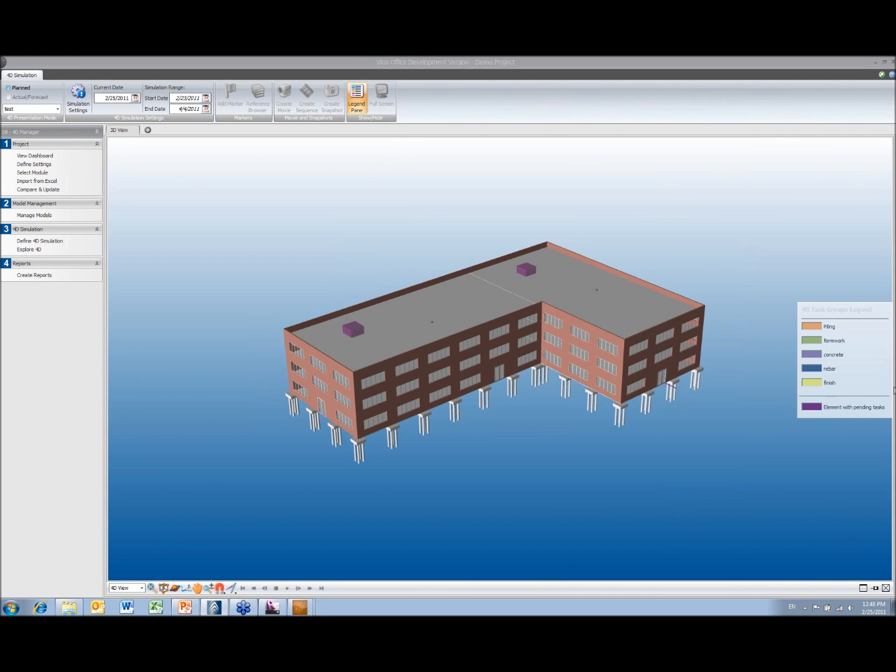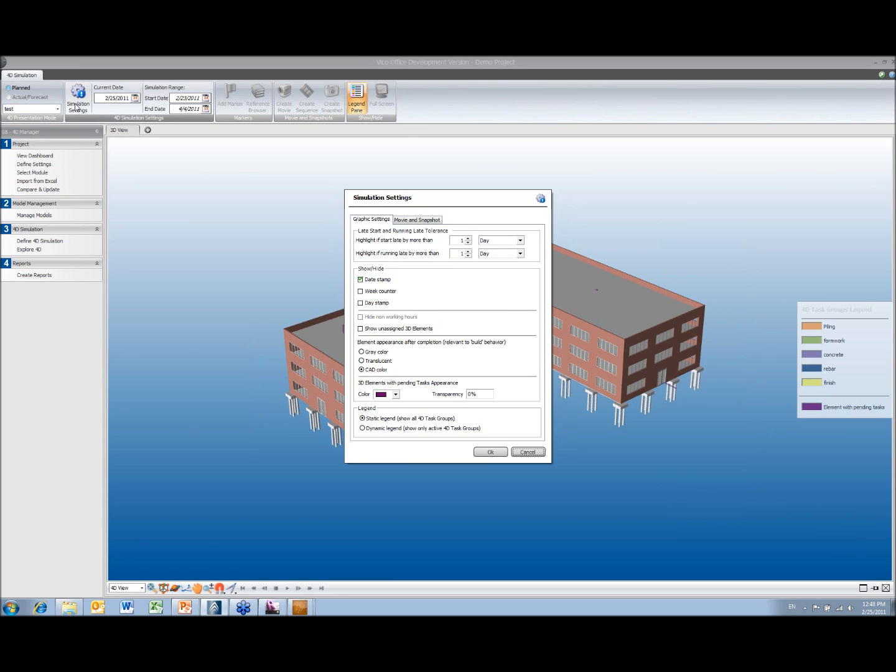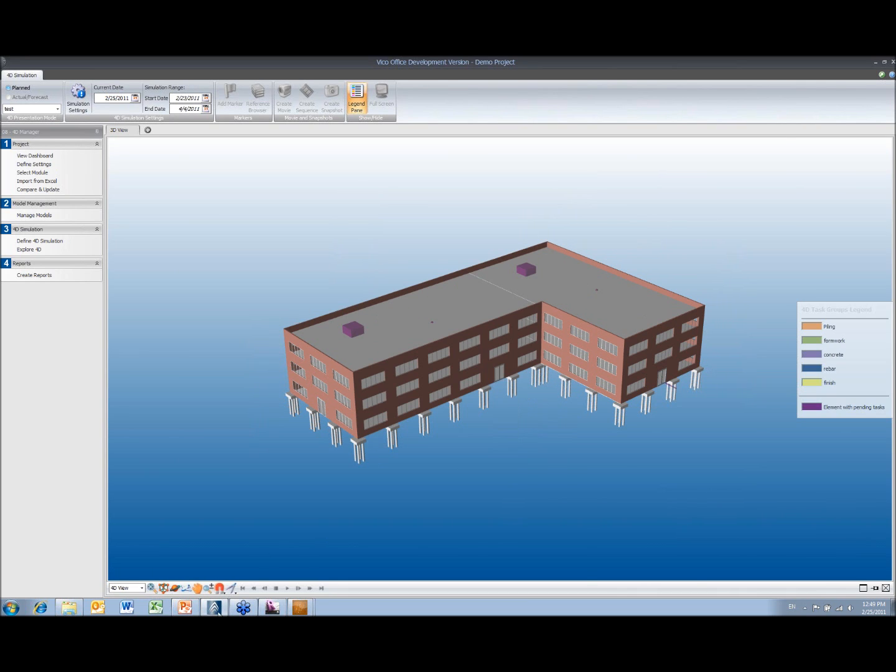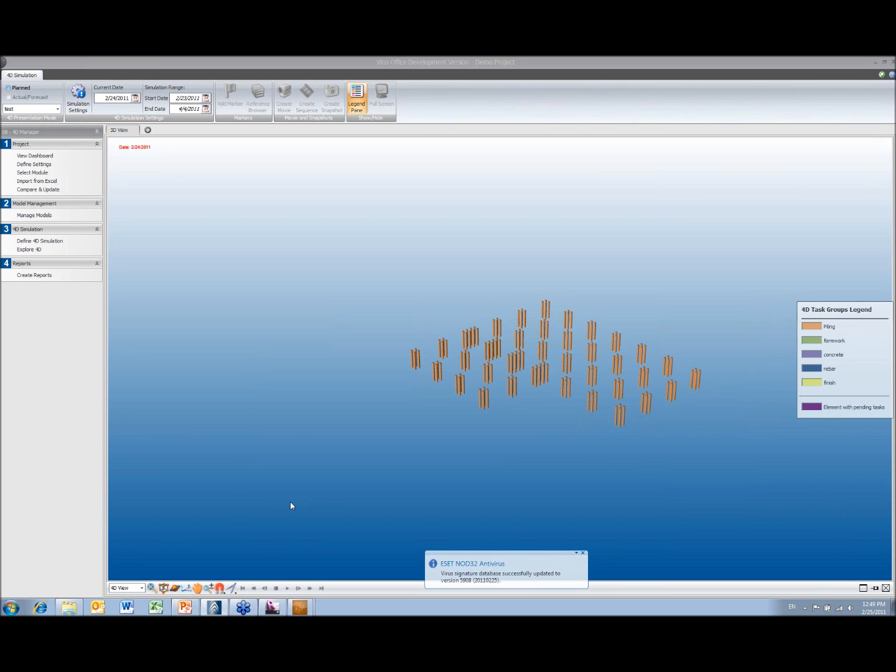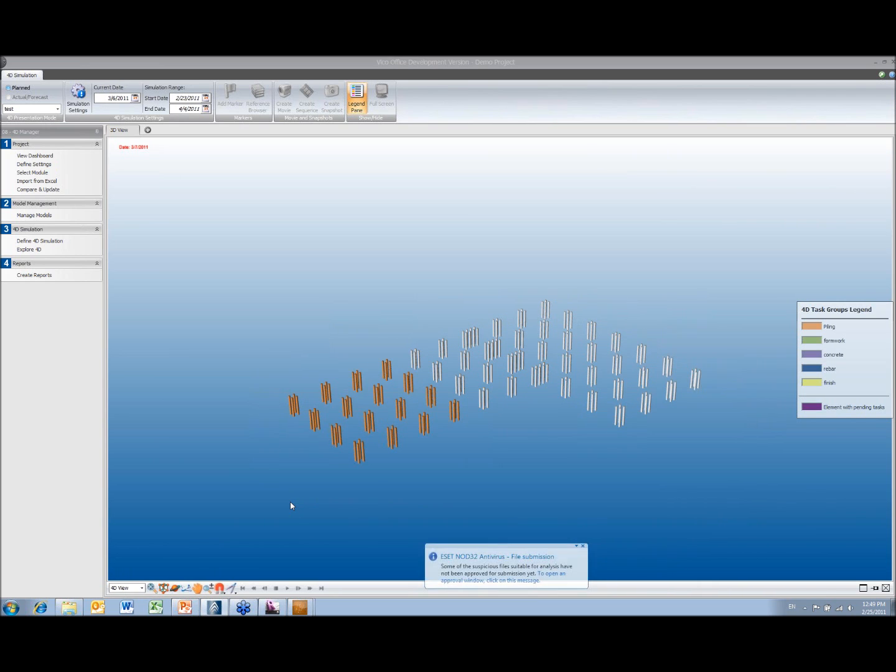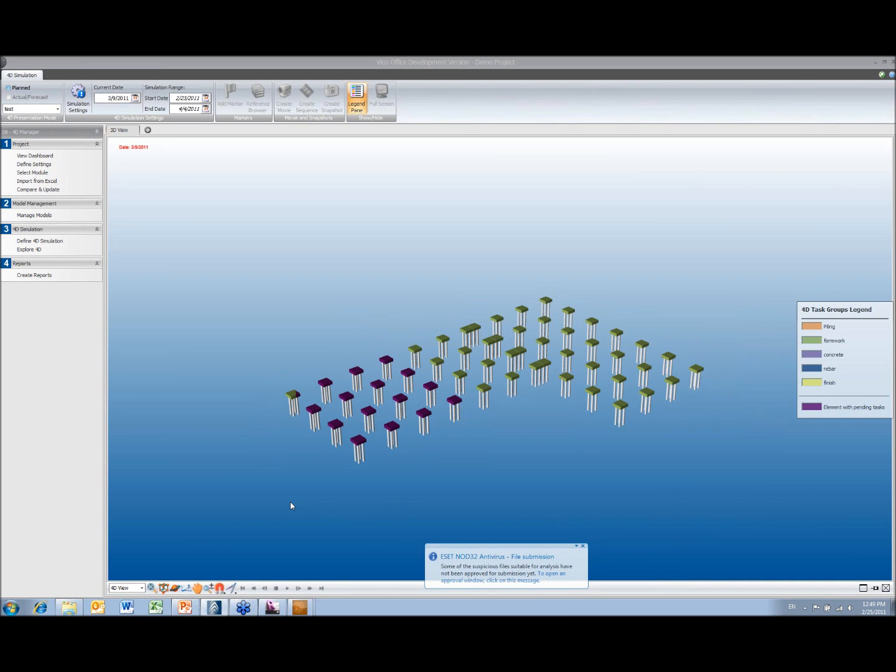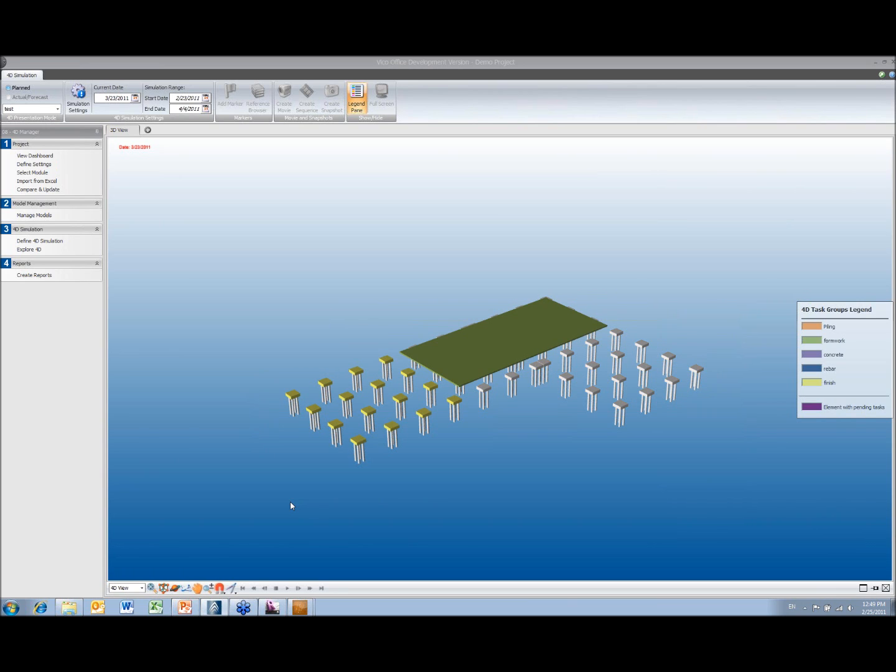We can show a legend on this side. Just make sure that the rest of them isn't going to show, and we're ready to view. So we're getting instant feedback on the estimate, and we're getting instant feedback on the schedule. As soon as we've created the schedule, we can see an exact representation of it in 4D. And if anything is updated, the estimate is updated, so is the schedule, so is the 4D. So any design changes are just automatically done. No work is ever actually wasted and has to be redone.